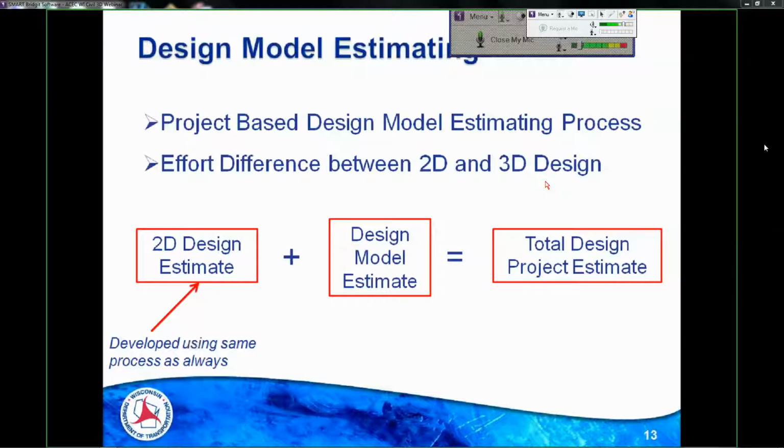So when we were pulling together those extra work elements, we really got into the details, a very granular level of identifying extra work elements. Just to demonstrate that point, one of the extra work elements that we identified is that you have to write out a LandXML file for your alignments and profiles. We all estimated it at 15 minutes, which was the smallest unit that we were using, a quarter of an hour, but it's still something we had to do. It's something we didn't do before. So we got into the details and we did everything we could to identify all of those extra work elements.